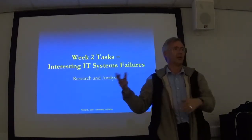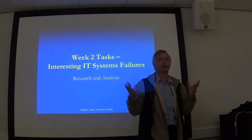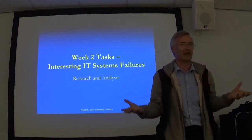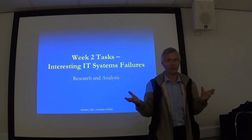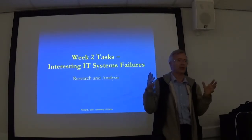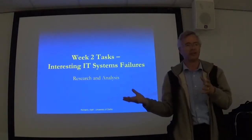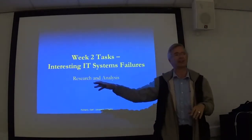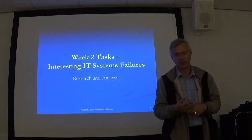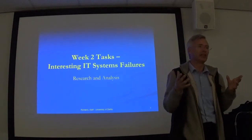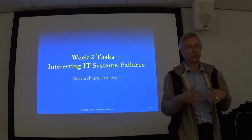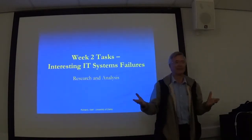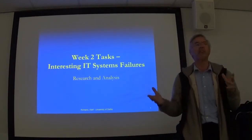This is rather bizarre, because the customers for whom the systems are doing things still have those real-world requirements. There's a disconnect: the Pareto rule says only 20% of tasks are of value, the other 80% aren't relevant — even though they are required by parts of the organisation or by external customers. And if you're only getting 40% of the contracted functionality delivered, 40% of 20% is 8%, meaning user departments are getting just 8% of the functionality they actually need.